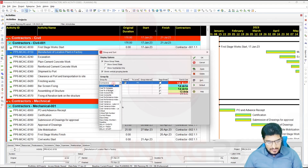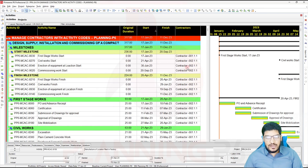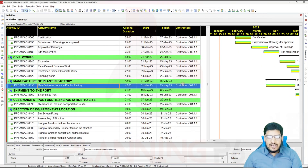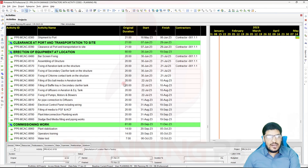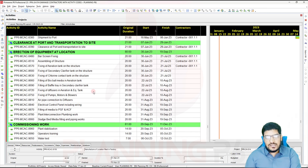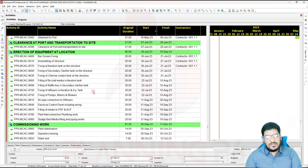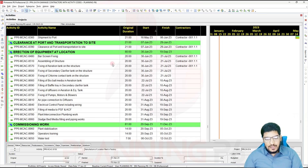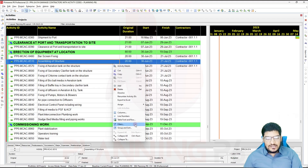For example, I will go to the WBS. Here I will apply WBS grouping and OK. Now it is rolling up by the WBS level, dates, and everything. Milestones don't have any contractor. Some items I don't have WBS separately for, so I can manage by the contractor as well. Either you have the WBS and under the WBS there are different activities managed by different contractors. If the project has 25,000 or 20,000 activities, you can manage by this way — managing the contractor.